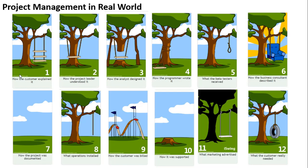The customer can guide you, and you can guide the customer — they get to see the actual product and how it will look. If you show them early on that this is how their swing will look, they will tell you right away 'no, I want a tire here, not this.' Once they see it, they realize how different their perspective was when they gave you the requirement. That's why people are moving towards agile — a continuous feedback loop with an iterative approach, so there are no surprises at the end. We'll go further into these details in the next section.